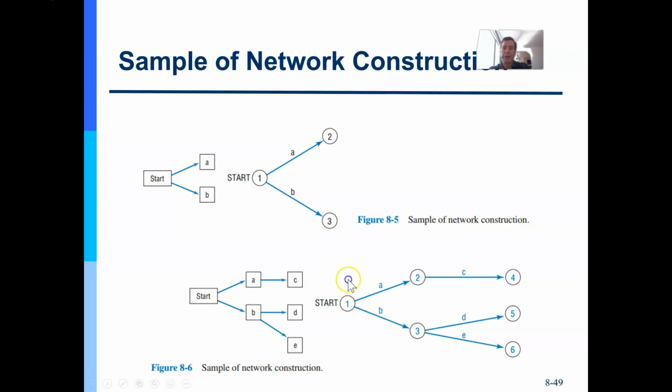And then by doing that, I end up adding activities with the predecessor, successor, predecessor, successor. Now A is a predecessor to C, which is a successor, and B is a predecessor to the successors D and E. I said these were dependency arrows, so A must happen before C gets done.